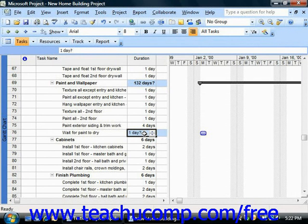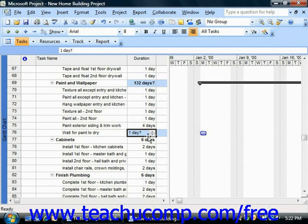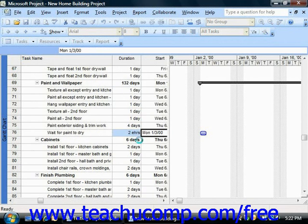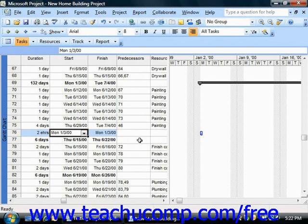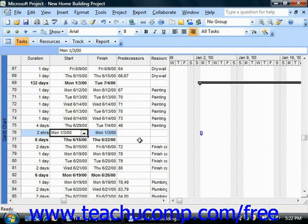So using the example, you could enter an elapsed task duration for the 'wait for paint to dry' task that sets an elapsed time of two hours that do not need to be performed during scheduled work hours for the selected task. So while the vast majority of tasks that you perform are not elapsed time tasks, it is useful to know how to set the duration of these types of activities if needed.